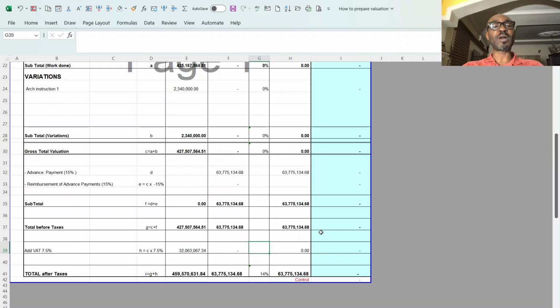And our rule book has set out a procedure by which this process should be approached. One of which is that a date and time will be chosen by both parties that is convenient for them, and both of them will visit the site at the end of the month, where they will assess the progress of the job done within that month.